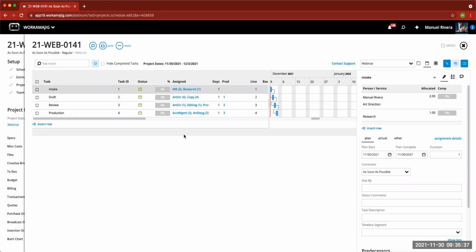They can also be considered as buckets of information that you want to accomplish for this project to be completed. You can see that I've named mine very simply, very generically. They're numbered by task IDs, lines on the grid. But what makes this work, especially by the graphical representation here, and I can zoom in on this Gantt chart by clicking on that more day view here, today being Tuesday, is that we can see a cascading effect due to the fact that we have these rules for predecessors.